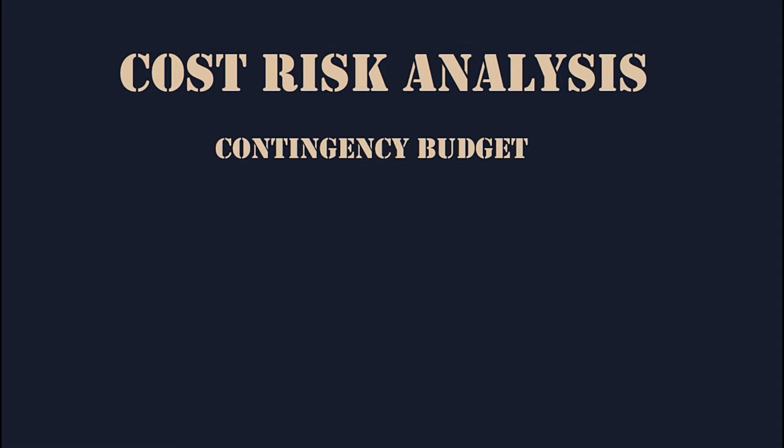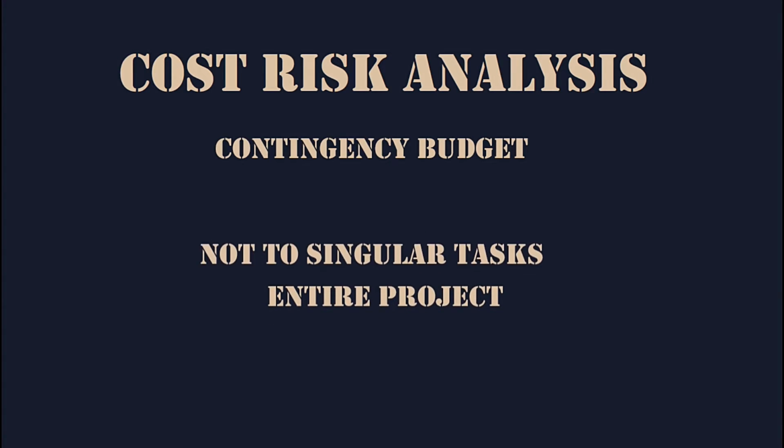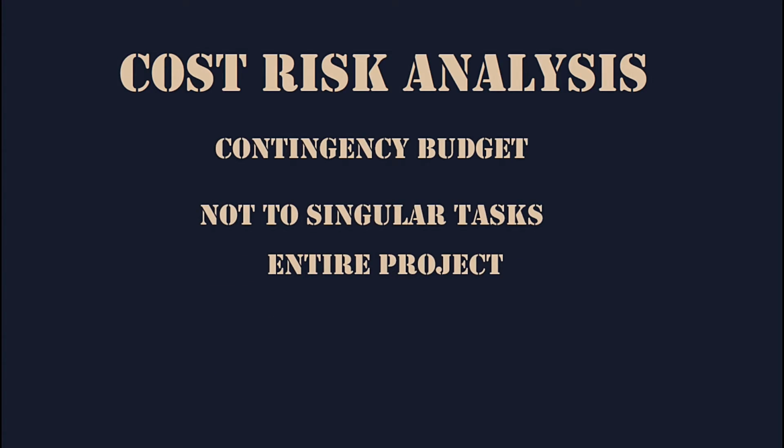The important thing here is to remember that you should keep the contingency budget for the entire project, not for singular tasks. Some tasks might get a little more out of budget than others. That way, the project manager has the ability to adjust the budget of the entire project, and he or she will be able to adjust the costs accordingly.